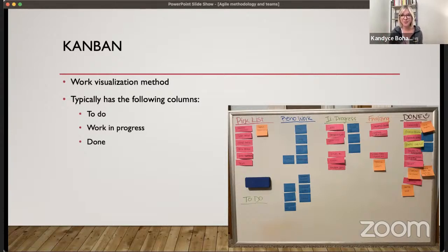And this concept of done is something that if you ever do agile development, I'm sure you will hear. There's a difference between dev done and done. A developer might tell you something is done, and then your testing person might go in and find an edge case and a new bug that needs to be resolved. So it didn't really get all the way to done. It's not done, it's dev done. You may experience that in the world one day.